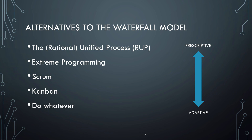In order to better deal with change, alternative development processes have evolved from the waterfall model. You can put them on a scale that indicates how well the methodology copes with change. The unified process model, also called UP or RUP — Rational Unified Process — is still pretty strict. More agile processes such as extreme programming and scrum leave more freedom to the team to adapt. And this is why agile processes have become the go-to approach for developing software. Computer science is still a young field, so at some point there will probably be a successor to agile that everybody flocks to.